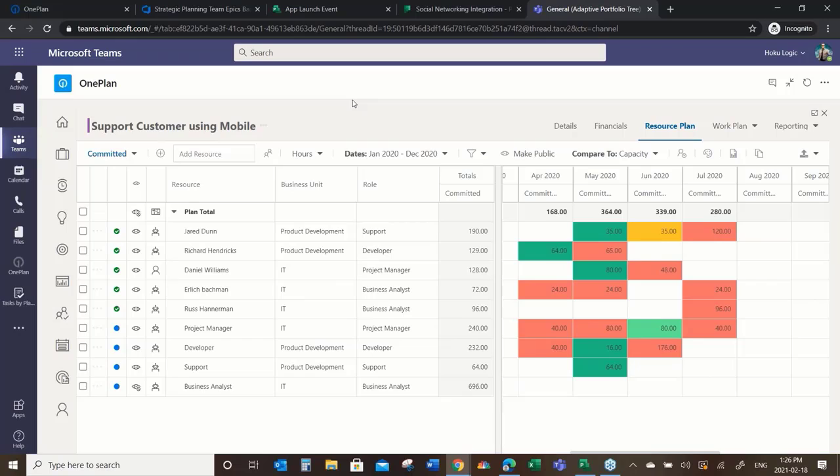And so here I have my list of resources. I have some generic resources I need to fill in, but I'm just using one of the four I showed you, but all of them would have this same capability to define what resources I need, how much I need them for in a given month, in this case, or week if you want to go to that level, and what that means in terms of the other capacity or the other tasks that they're assigned to across the organization. If every project uses this common frame, we abstract ourselves from the ways that each of those independent tools handle resource management and give us a common language and a common interface to work with.